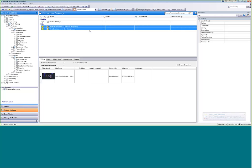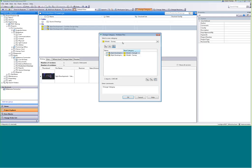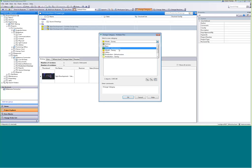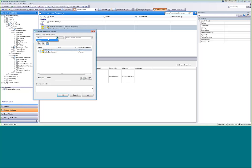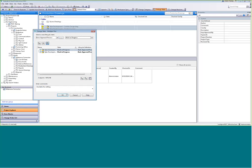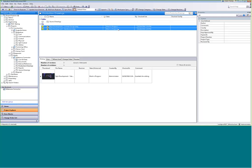The first thing we do is change the category of these drawings — 'Model Survey' is fine for survey drawings. These are all things you can set up yourself. We could call it 'Model Infrastructure' or 'Archive Drawing,' but I'll leave it as 'Model Survey.' Now let's change the state. I need to define a basic approval process for these. I have different states available: work-in-progress, for review, approved, or archive. Let's call them work-in-progress for now — hit OK and my state column now has something listed.